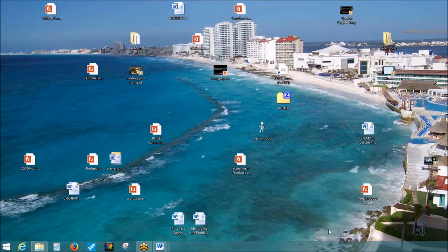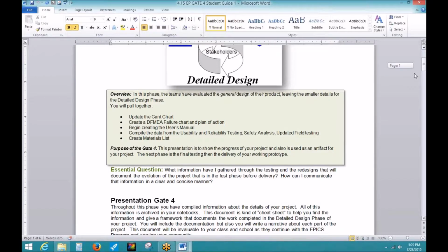You hit it exactly. That's exactly what should happen. Continually going back. That way you find out, especially before you get to a detailed design where you're getting to that final prototype, if they say you're way off, this is not what I want at all. You definitely want to get there before you try to make a working prototype and spend the money, because they will get to the point where they're redesigning their budget and getting the materials list and figuring out how they're going to do it.